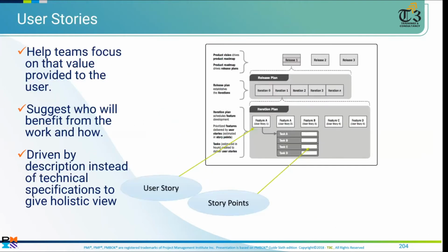So what is the benefit of user story? We try to understand it. If you remember what I said, epics into user story, epics into user story into task. Epic means there's a big requirement, and for this requirement, we can have multiple user stories. One epic can be released in one iteration, or it can be released after multiple iterations, based upon the size of the story.